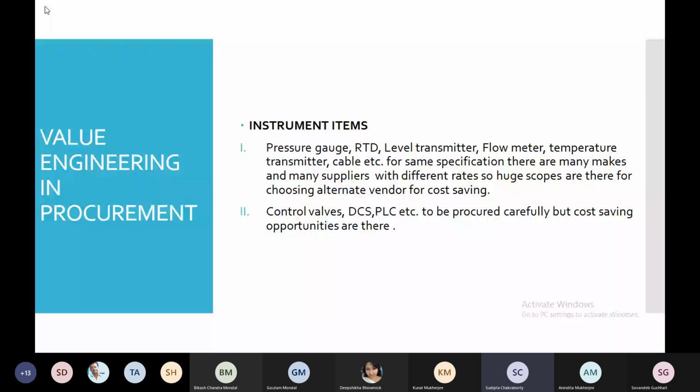But in the tender specification, if there is a mention that we require, say, 55 degrees, that the temperature range is required up to a maximum of 55 degrees, in that case the client is pressurizing us to take the product of 60 degrees centigrade, meaning the Honeywell product. This is happening in our Heavy Water Board project. In that case, we found that only Honeywell is the approved, technically accepted vendor, because the client is very reluctant to give any deviation, even a 5-degree deviation, for this product.